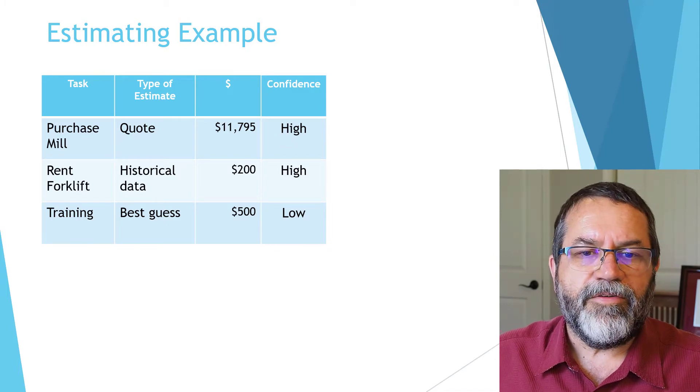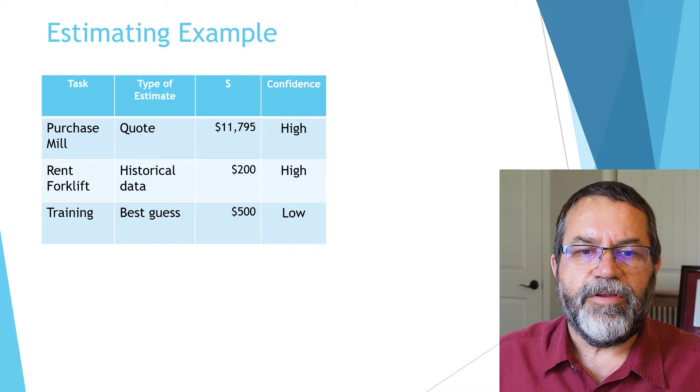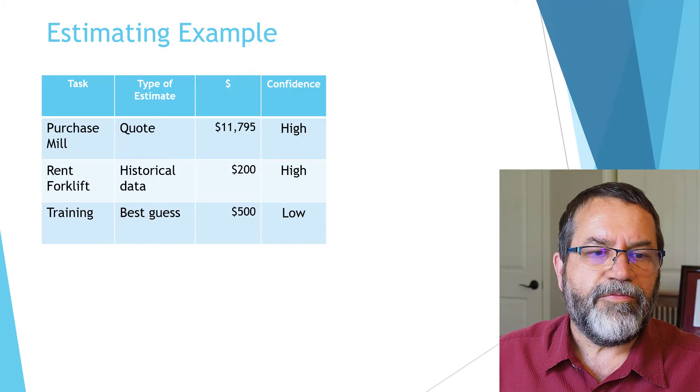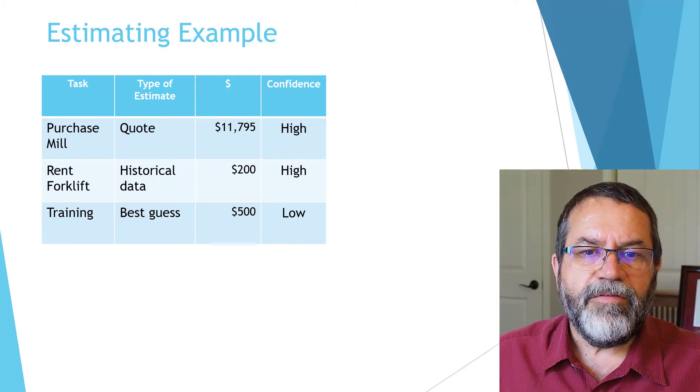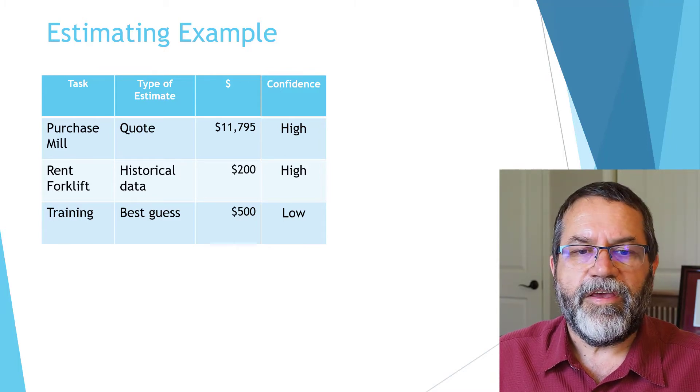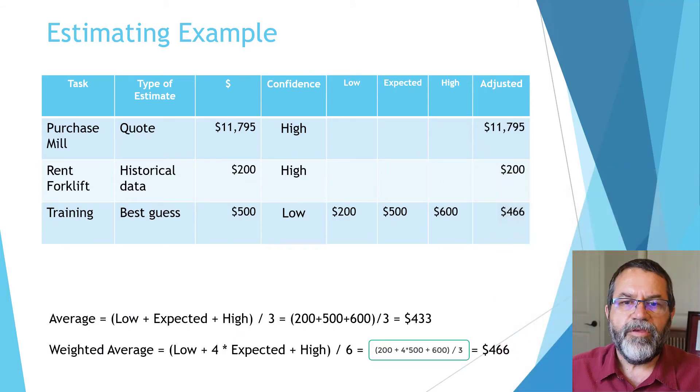The next step is evaluating how accurate my estimates are. For the first two, I think they're really good—I've got a quote for the machine and I know forklift rental costs. The training I don't have good confidence on; it's just a guess, so I put low confidence. Let's look at what we do with those.